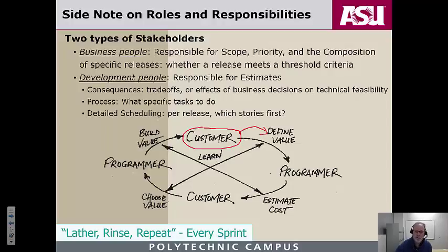When we talk about user stories next week, we'll talk about a concept called story points. We'll talk about assigning story points or business value to each requirement. So that prioritization is going to be done by the customer in terms of how valuable this feature or this thing would be to the overall product. All right, and that's how it gets to the top of the release. And again, the customer can change those priorities at any time, but at the time you sit down and do the sprint planning and finish this negotiation process, wherever the product backlog stands and the values have been assigned, that's where they stay for the purposes of sprint planning.